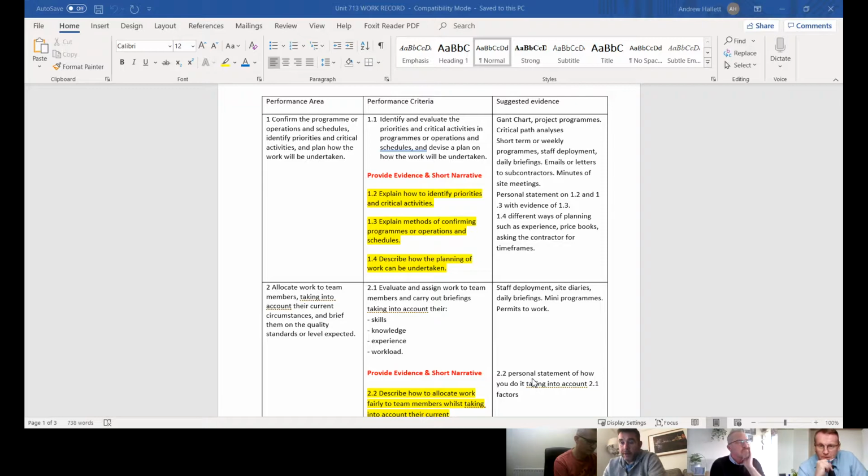They might put down how much meterage they're going to cover per shift, and how many gangs are on. Then obviously when we go out, James and myself will look at it and check the quantities of what's been done against it, and then we'll record it and say, yeah, there's so much done, we can sign that bit off, or right, you've still got X amount to do.